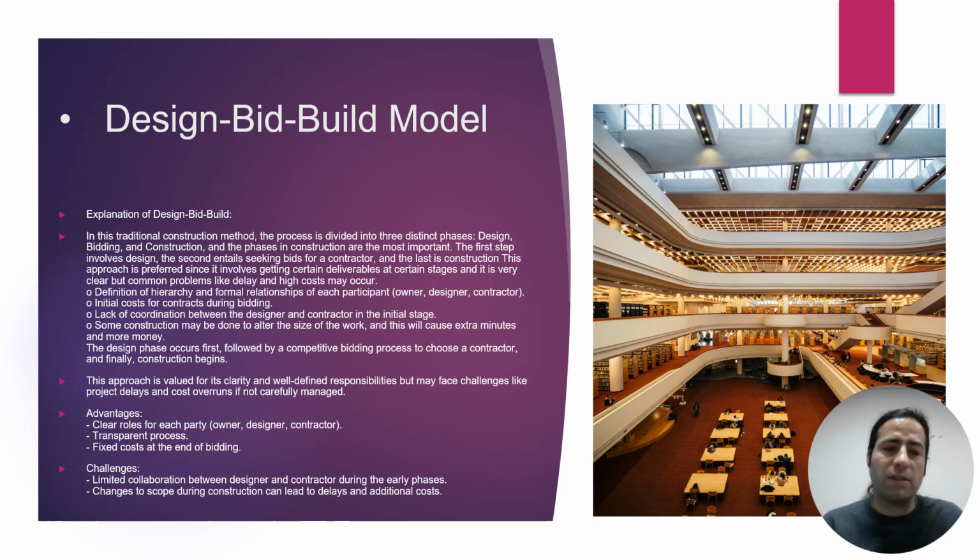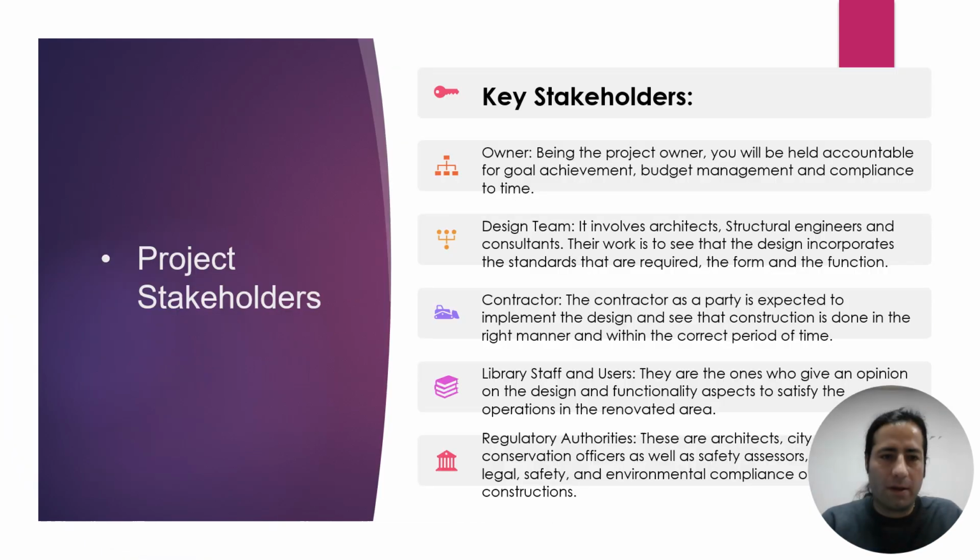We have advantages and challenges. For advantages: clear roles for each party, owner, designer, contractor, a transparent process, and fixed cost at the end of the bidding. And for the challenges: limited collaboration between the designer and the contractor during the early phase, and changes to scope during construction can lead to delay and additional costs.